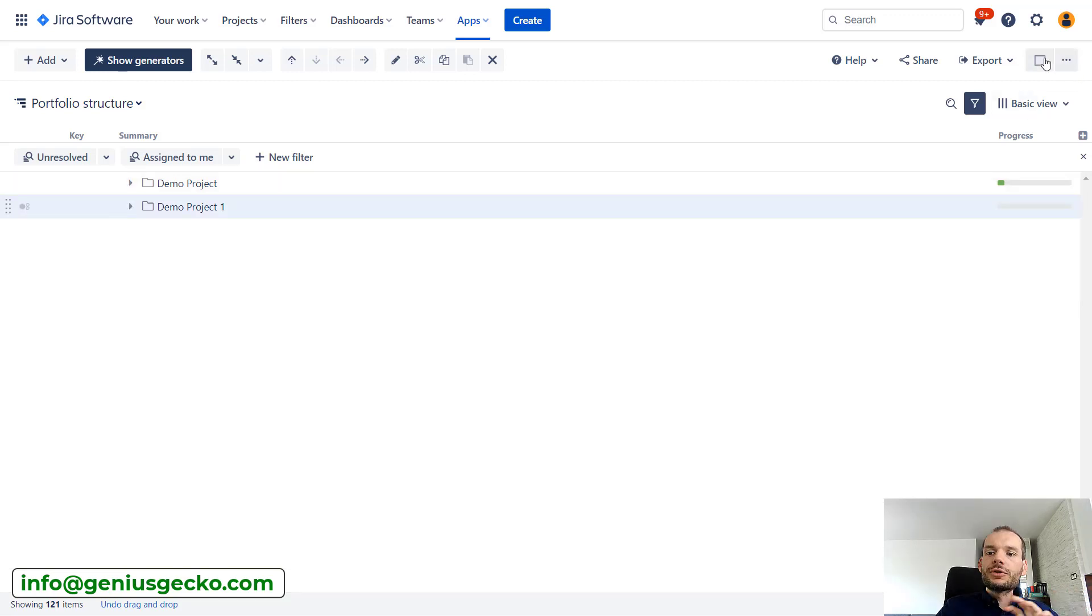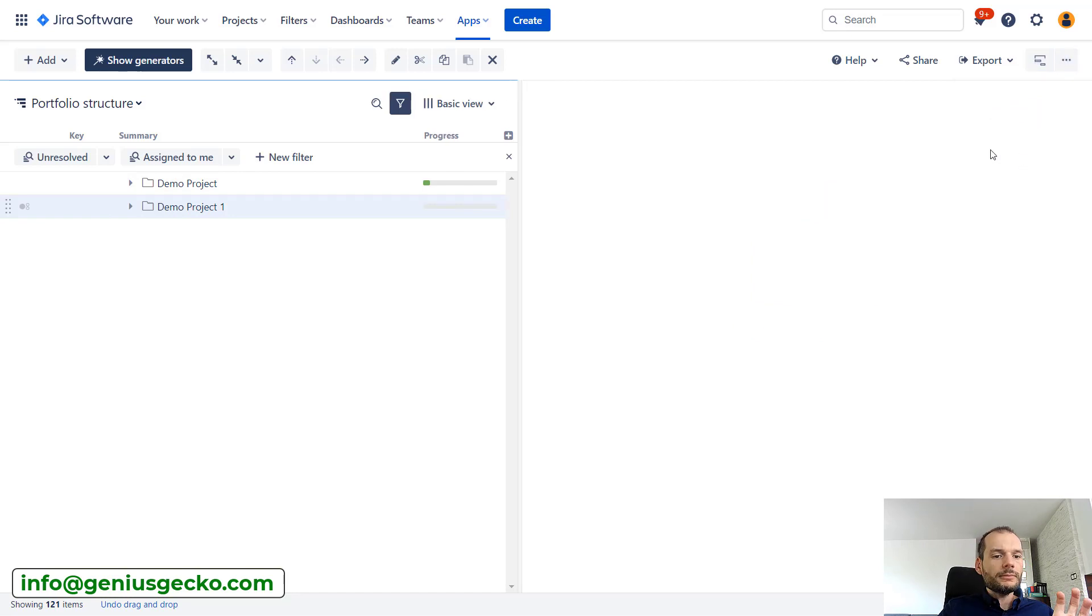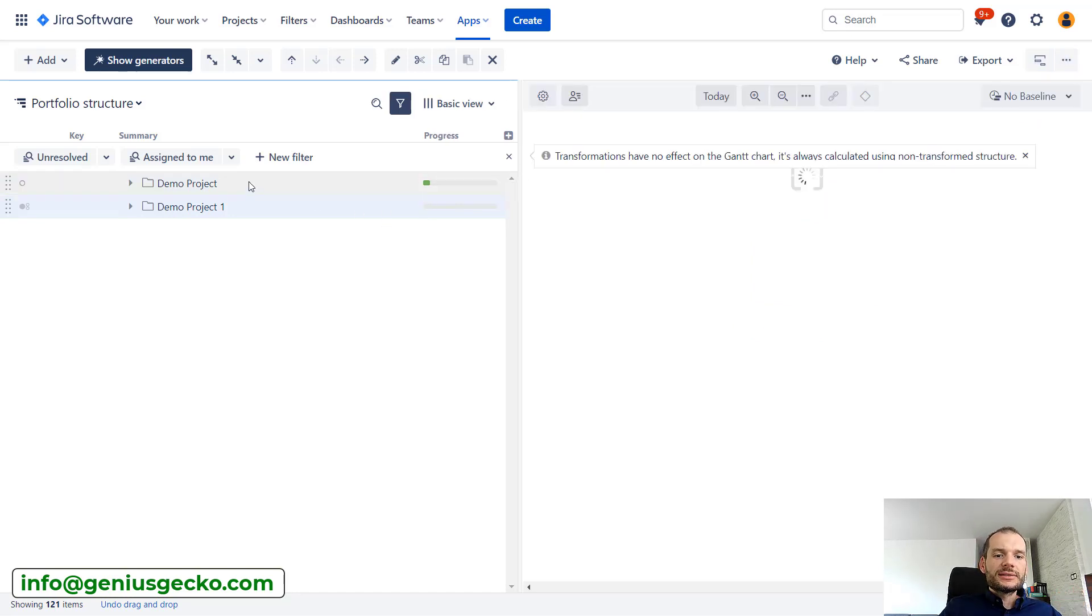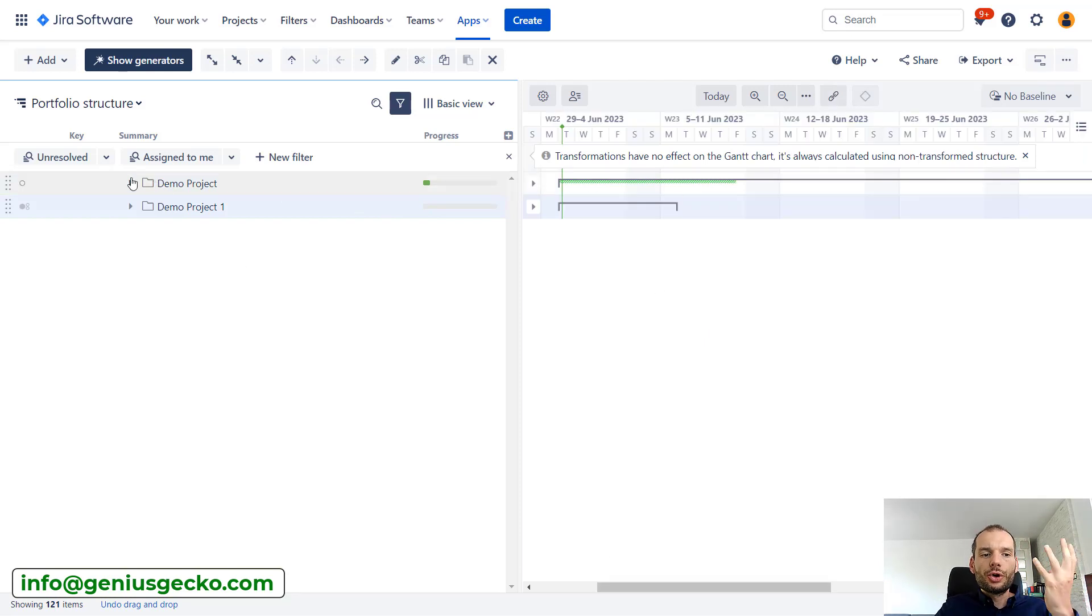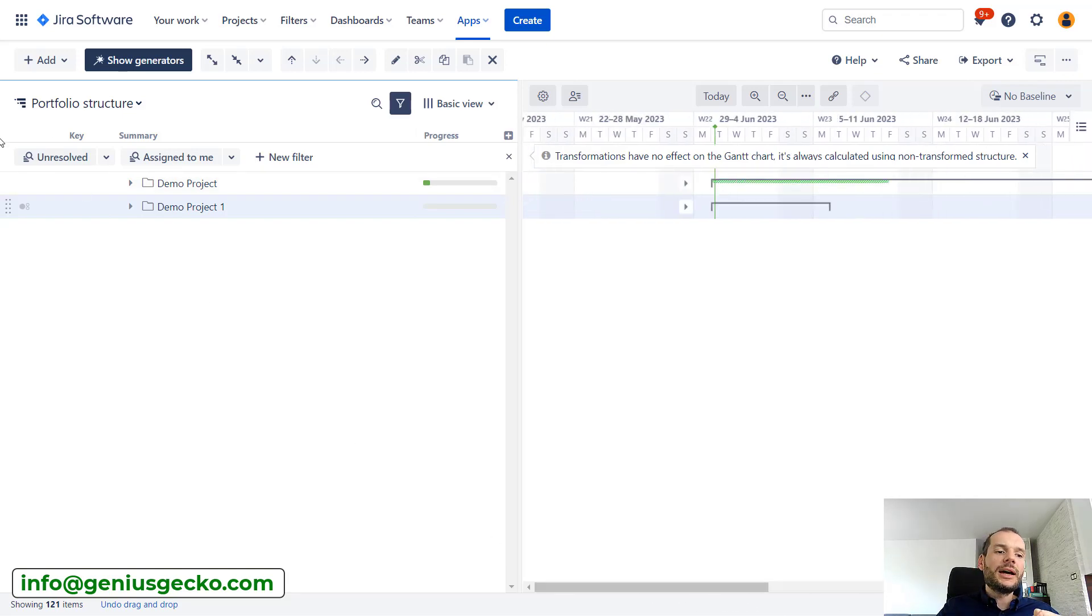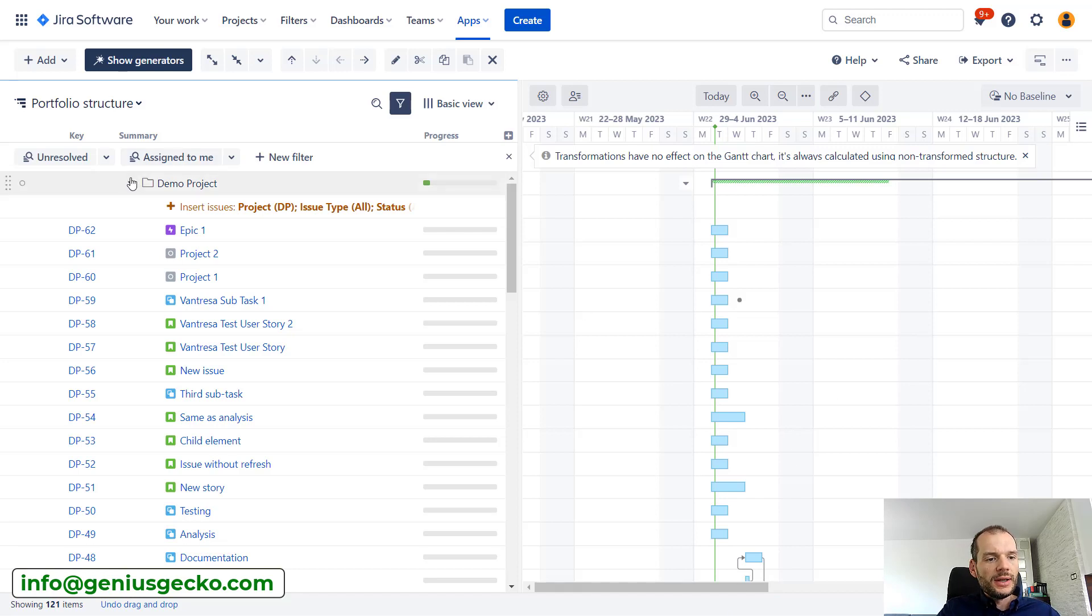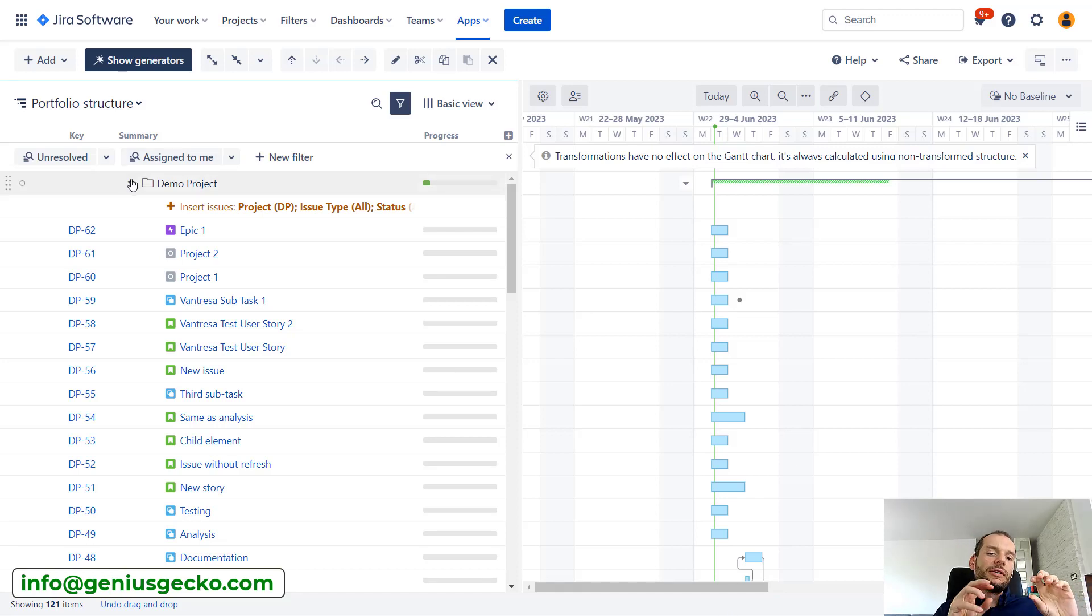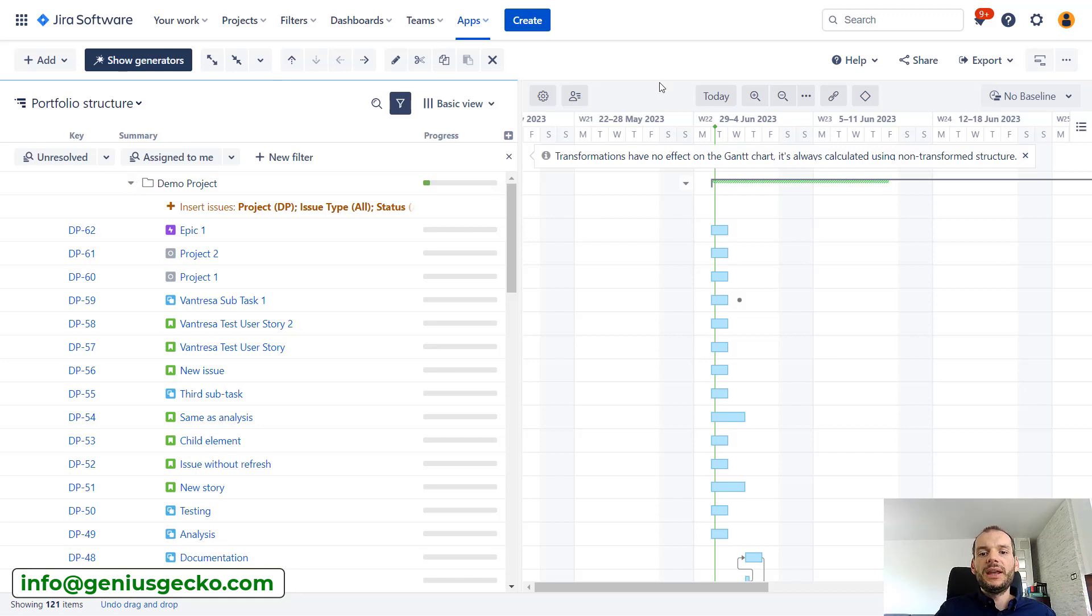Second benefit: if you're also using Structure Gantt, then projects or folders will be represented on the timeline also as separate elements. You can collapse your whole project and see where it ends on the timeline. You can obviously expand it and see where particular tasks go, but you have basically an additional level of hierarchy without the need to create additional issues.